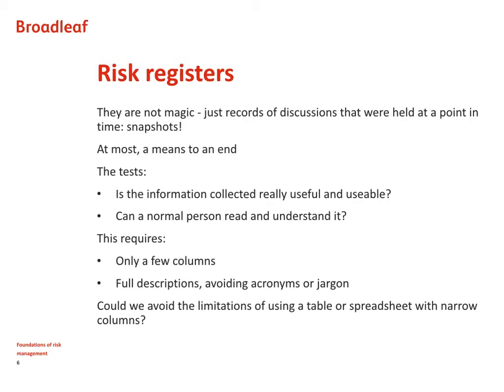We've all got into the habit of using spreadsheets as risk registers, but we should recognise their limitations. Firstly, the narrowness of the column makes it extremely difficult to write and read material. And secondly, certainly with Excel, there are limitations as to the number of characters you can store in a cell.